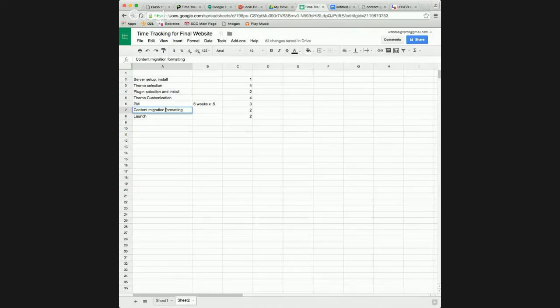And so you estimated 3 pages per hour? That's what we came up with after keeping track. And that's for sites where you've got at least 50 to 100 pages of content and those pages are at least 3 screens. That's a good average, I think.